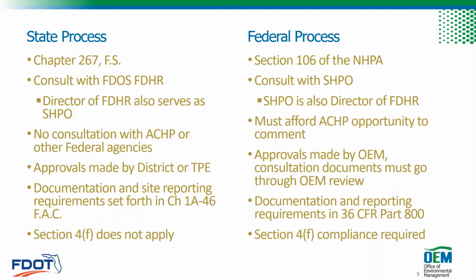The primary differences between the two review processes, like I said, are one, the role of the ACHP, but also the role of tribal governments in consultation, and the involvement of OEM, and I'll get to that a bit later. And two, the specific reporting requirements for state projects, which are set forth in Chapter 1A-46 of the Florida Administrative Code. So as you can see, ACHP consultation is only required for federal projects, and that's true for tribal consultation as well, but I will talk more about that in a second.